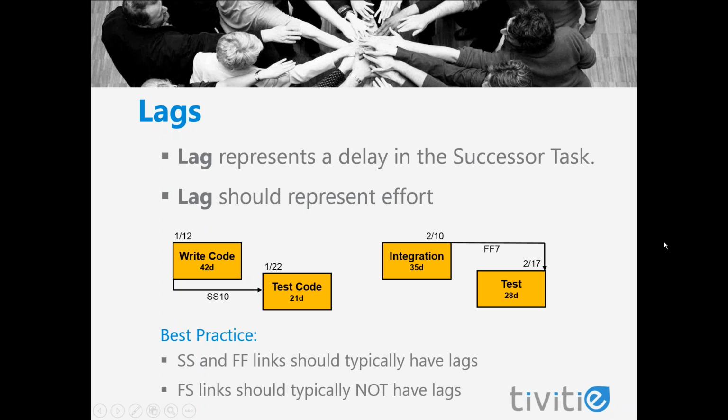We recommend as a best practice that start-to-start and finish-to-finish links should typically have lags associated, and that finish-to-start links should typically not have lags.